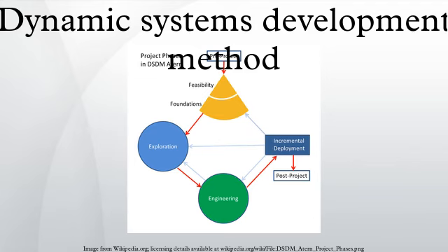Stage 1B, the business study. The business study extends the feasibility study. After the project has been deemed feasible for the use of DSDM, this stage examines the influenced business processes, user groups involved and their respective needs and wishes. Again, workshops are one of the most valuable techniques, workshops in which the different stakeholders come together to discuss the proposed system. The information from these sessions is combined into a requirements list. An important property of the requirements list is the fact that the requirements are prioritized. These requirements are prioritized using the MoSCoW approach.